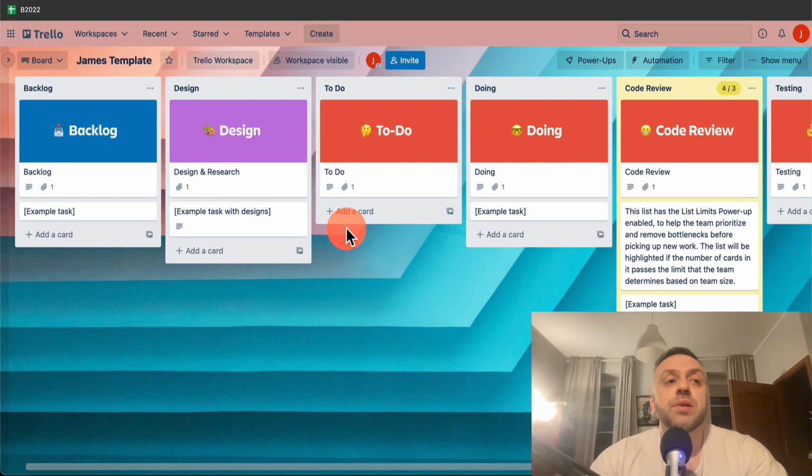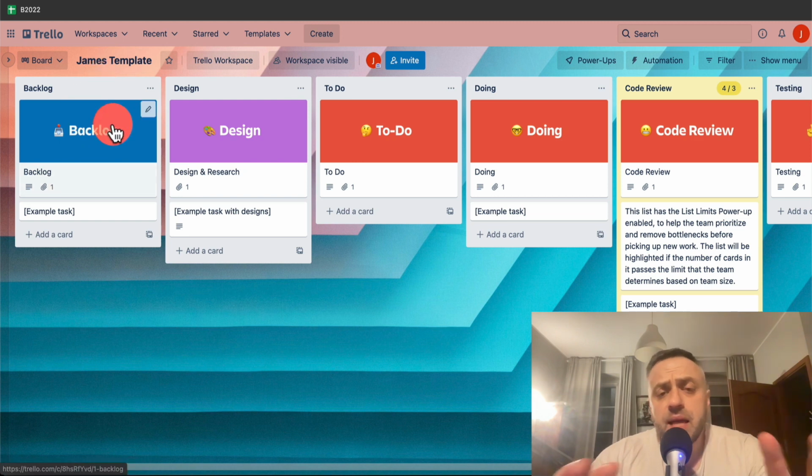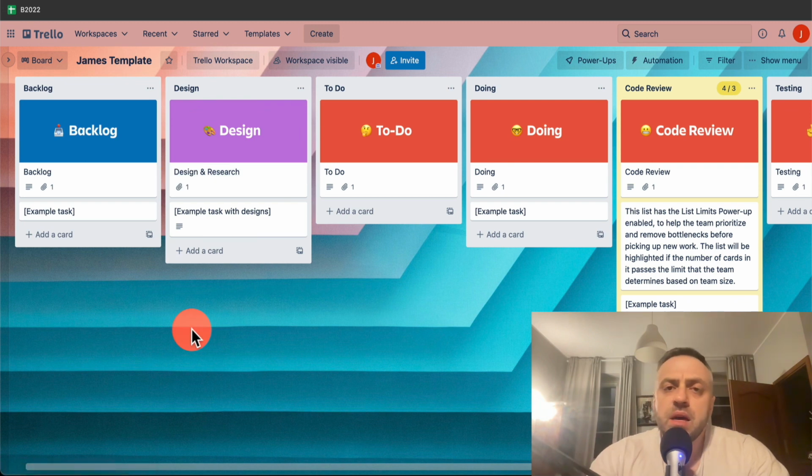And the way it works here is that we have various columns here, and these are essentially statuses, okay? And the statuses and the number of columns and the name of the column is gonna be fixed per a specific board. So you can have multiple boards, but in each specific board, you might have different tasks. And the tasks, they could go up in value. And the tasks, they can change, right? They're dynamic. Maybe one day you have 20 tasks. And perhaps the next day you have 2 tasks, right? They change. But what doesn't change are the columns, right?